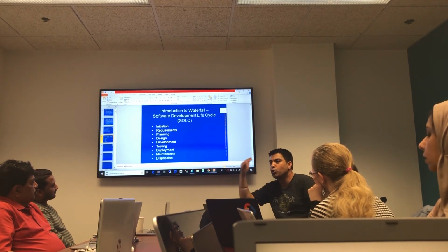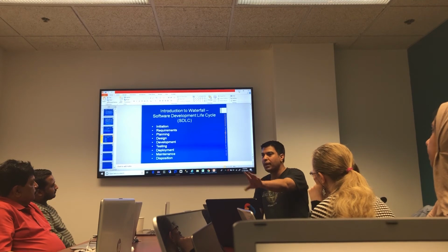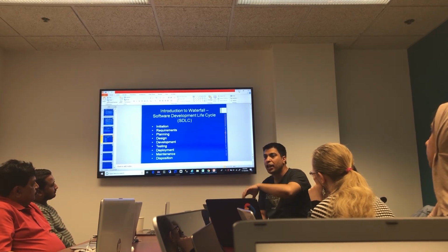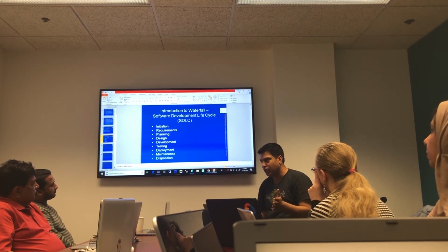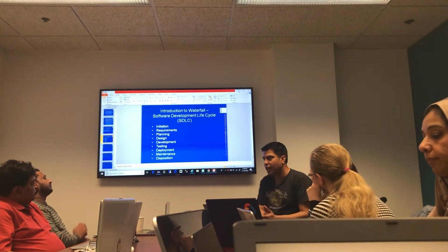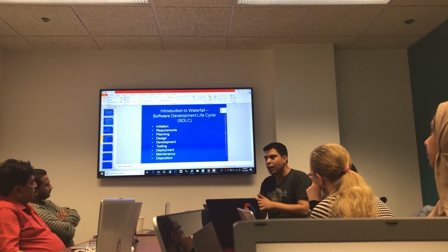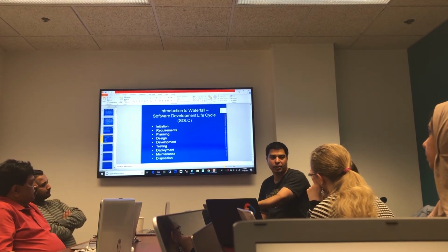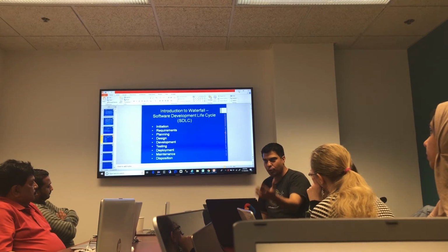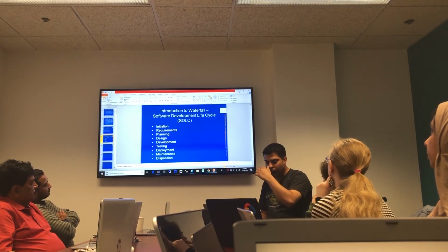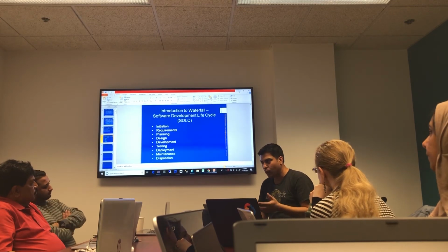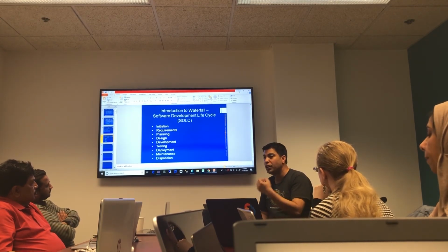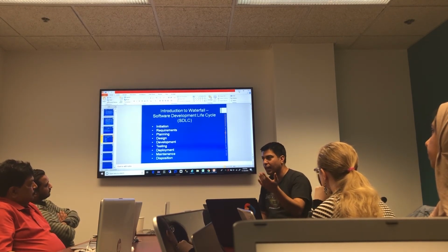The later you change, now a requirement can not only be adding something new, it can be changing something that you have. Okay? So there are 3 ways requirements can change. Add a new functionality, delete a functionality, or change the existing functionality. All 3 have impact, so the right term for this is a change request coming from the client.